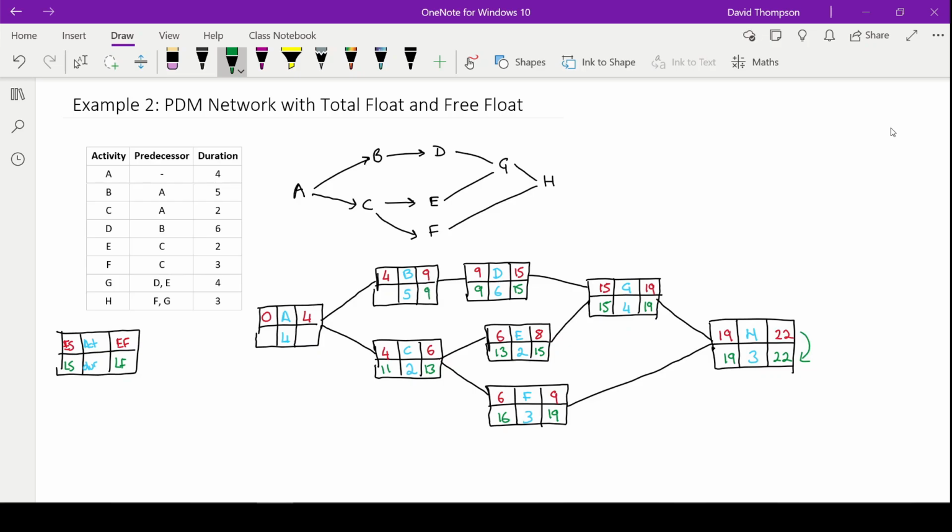And then that 9 minus 5 is going to be 4. And again, like we did last time, now we have a latest start time of day 4 for activity B, and a latest start time of day 11 for activity C. So obviously for this one, we're going to pick the smallest one, because that's what you do in the backward pass. So we're going to bring the 4 over here. And now we actually have 4 minus 4, and that's going to be 0.